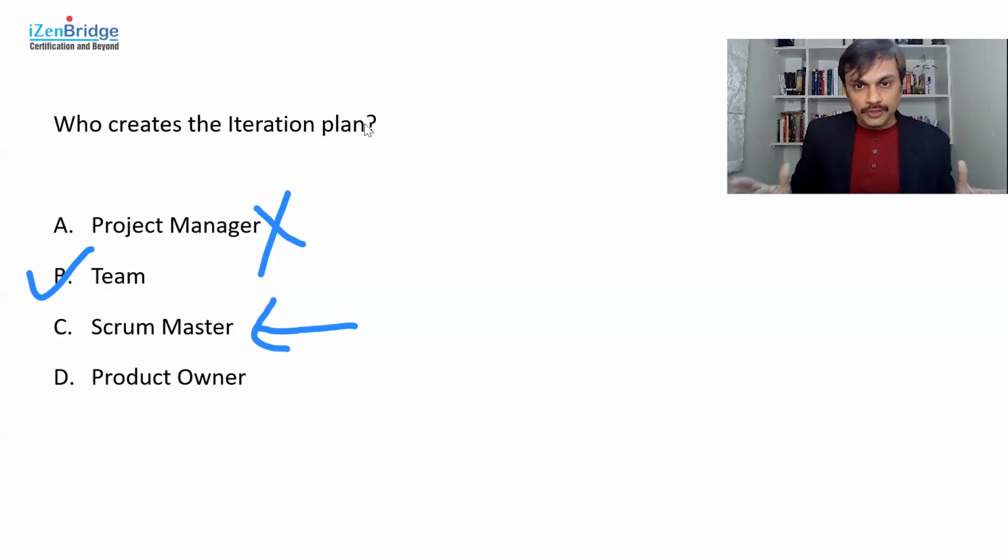So that's the role of a product owner, but the execution, the planning of that execution is primarily on the team. So whenever you see a question related to detailed planning, figuring out how I should do my job, in general, we should focus on the team or the individual who is executing it, because the overall essence of modern-day management is self-organizing and more autonomy for the execution to the person or the team who is doing the job.